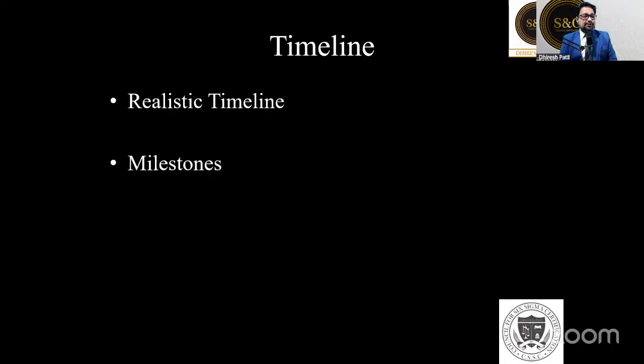The second constraint is that we have to go deep down into causes and root causes and validate them with data. And it takes time. If you want to do a superficial job, it's a compromise to the Lean Six Sigma project, which you should not accept in the first place. So what is a realistic timeline? I always mention this: yellow belt projects, very small projects, generally at least you can expect 1 month to deliver some results.